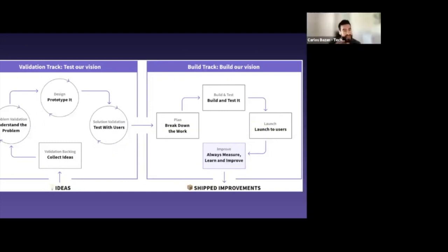The next phase is development and test. The development and test phase is where we build the features, address any bugs, technical debt, and test those solutions before launching them. So the engineering manager will assign an issue to an engineer who is going to be responsible for building the feature. An engineer can also self-service and pick the next priority order issue from the ready for development queue. When the work is done, we merge the changes into production and close out the issue.